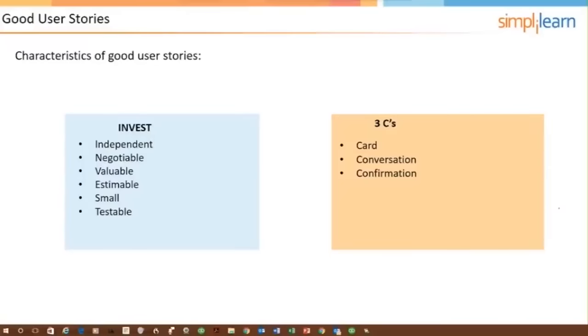That's where the team and the product owner discuss. And then eventually there will be acceptance tests included on the user story card in order to be used during the sprint review to assure that it's acceptable, that there's confirmation. Okay, so let's add that to the memorization list.